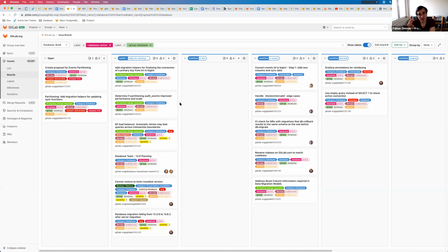The interesting thing is that you'll probably see that quite a few things pile up here. So I like to keep these boards really tidy, right? And if something sits in ready for development for longer than a couple of weeks, it's probably too stale, right? It's actually not a priority. It's just hanging out there. You should remove it and reprioritize. So I think it keeps it very lean, right? This should never be super full, in my opinion. Yeah. So the triage flow I can explain in a second.